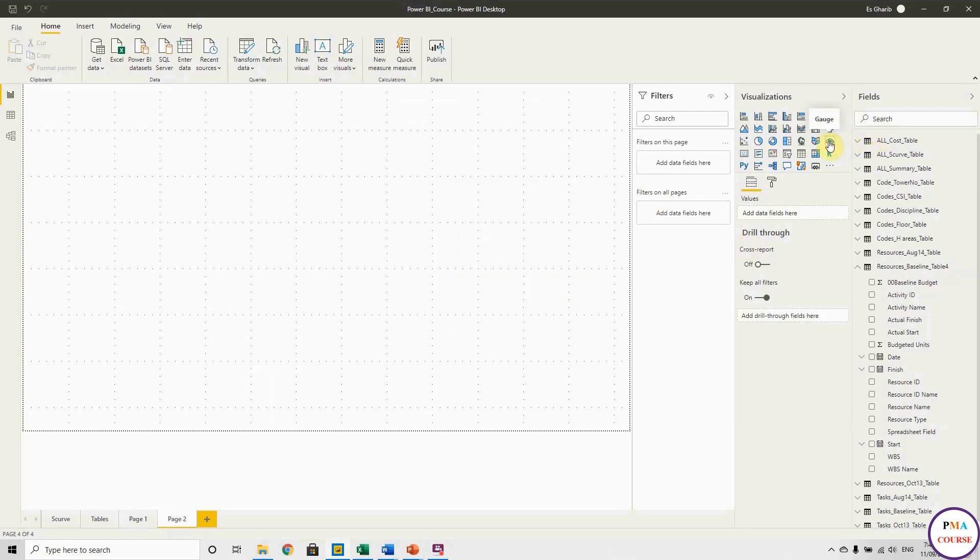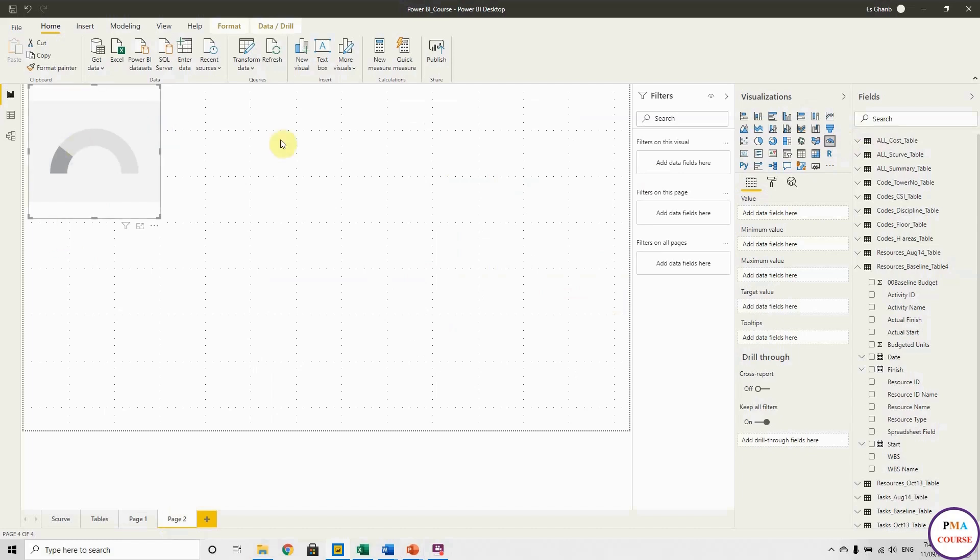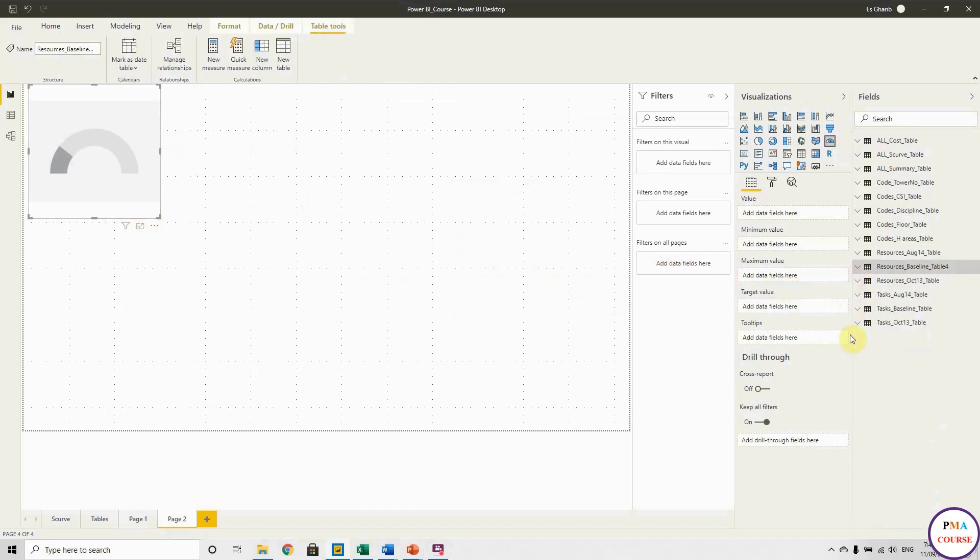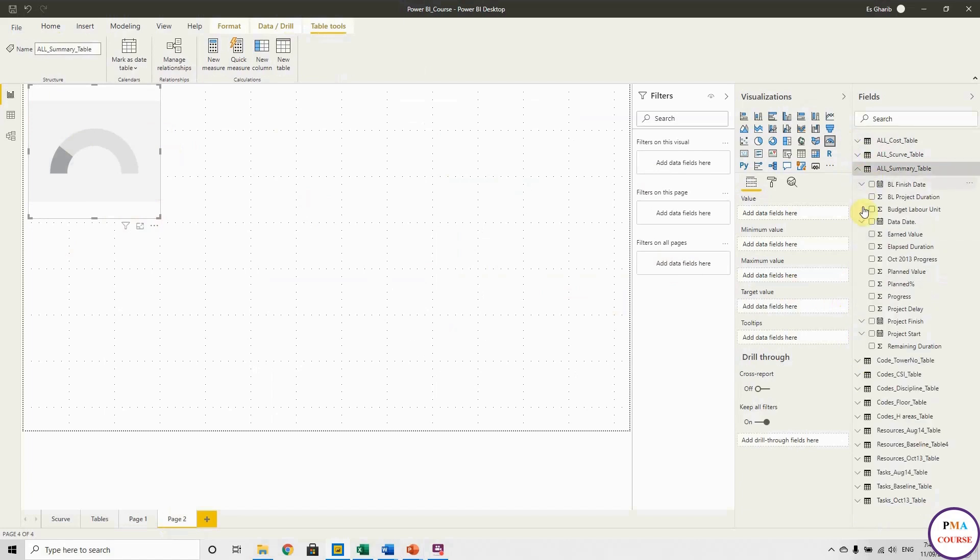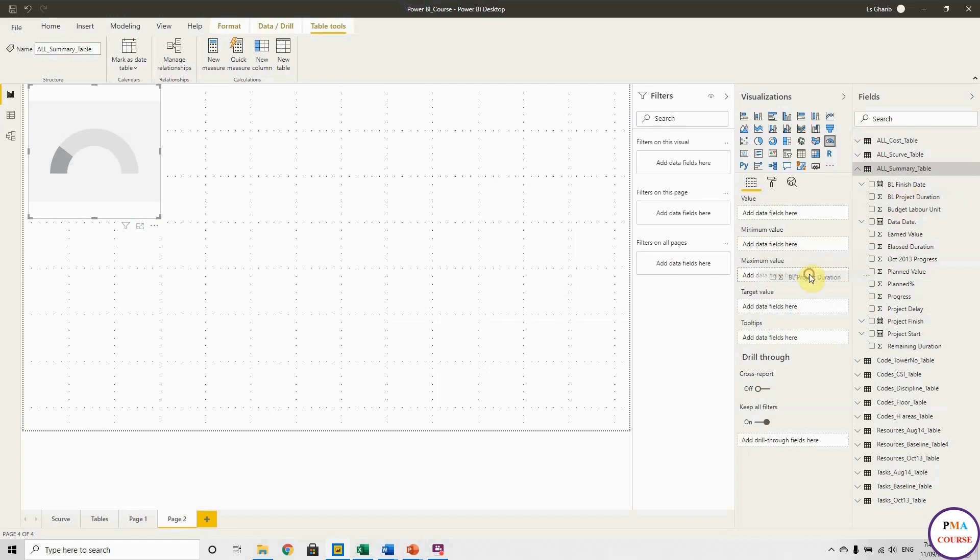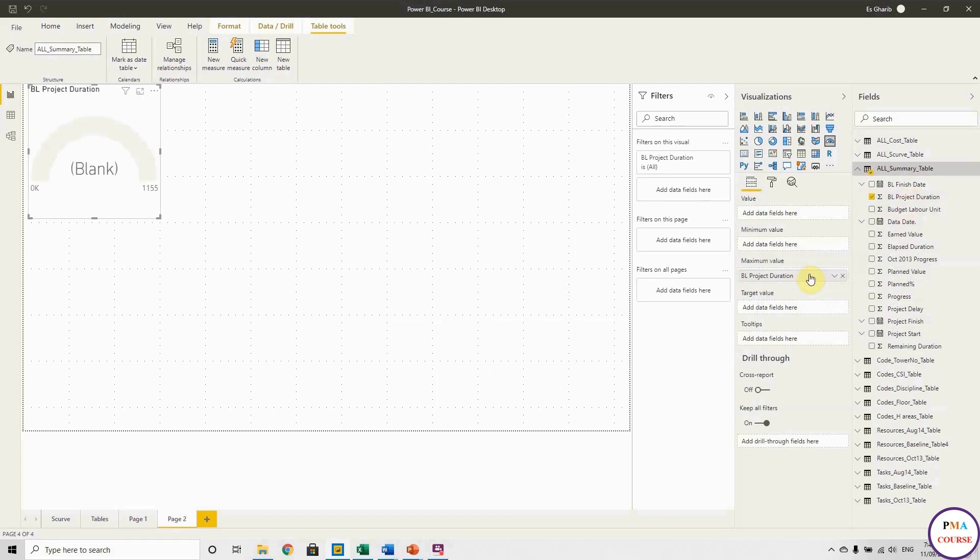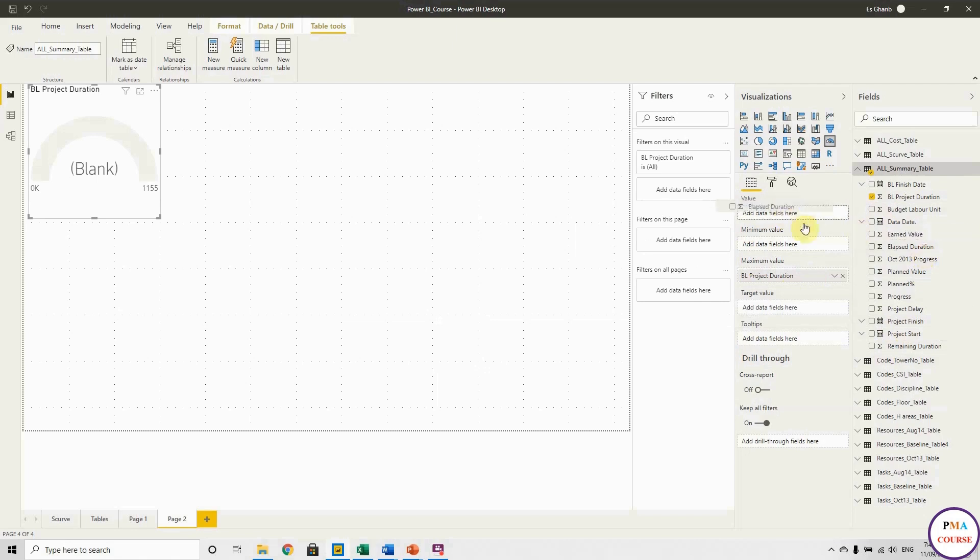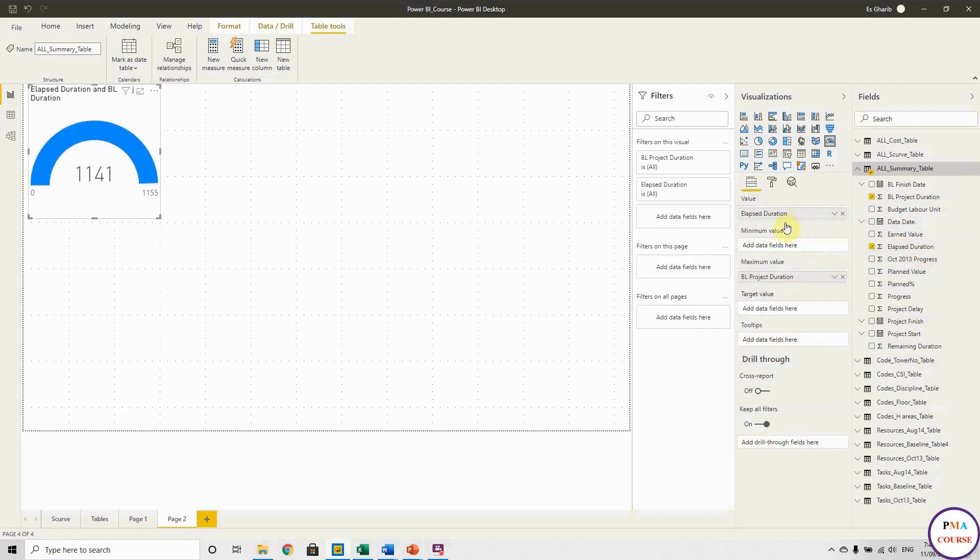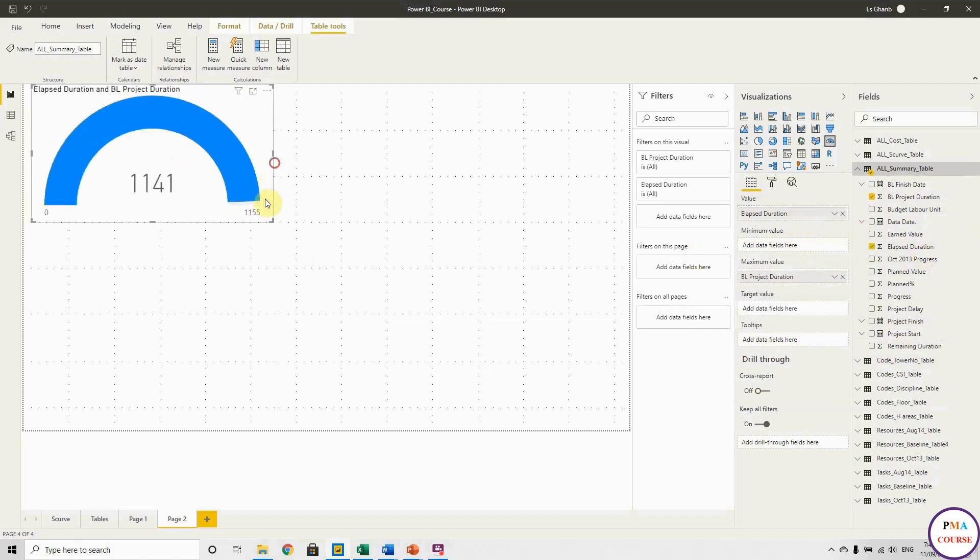So first we start with the gauge. This one is good to present a project duration. So we can get the project duration from the summary table. We have the minimum at zero and the maximum we put the project duration. And for the values we can put the elapsed duration. So let's look for the elapsed duration. Here, up. Okay, so that's the total duration 1155 and the elapsed duration 1141.